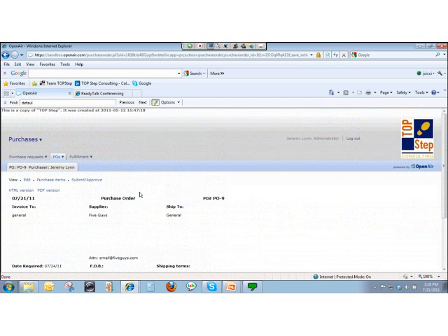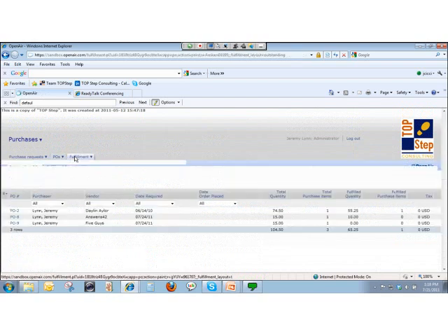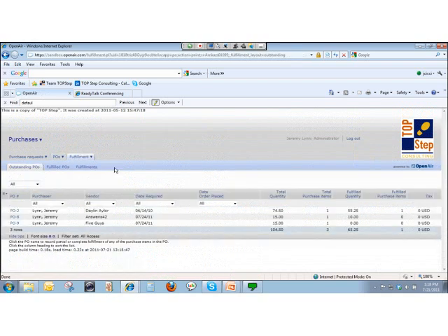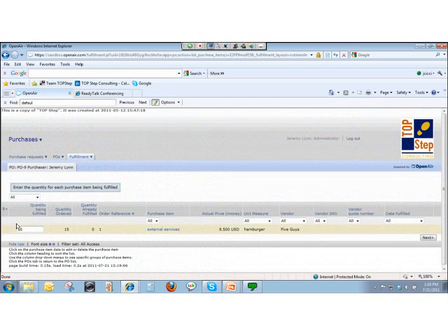And then the process is fulfillment. So I look at the outstanding POs that I have. And here I can see that I have a total quantity that I want to buy of 15, but I have not actually purchased any yet. I haven't been invoiced for any yet. And as the invoice comes in, and Five Guys says, okay, well today you bought 5, so I'm going to invoice you for 5. I click on the PO and I say, 5 have been fulfilled.